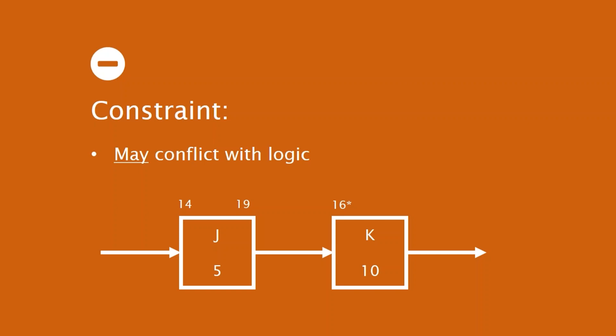Logic defines the order that I'm going to perform the work. And in scheduling, the order that I'm going to perform the work is paramount. So constraints are a little bit dicey in that they can be in conflict with the logic. We want to make sure that constraints are never used as an alternative to logic.